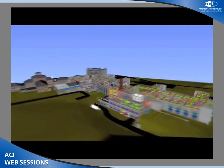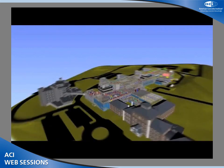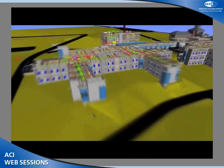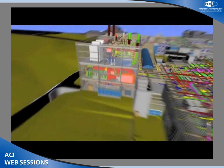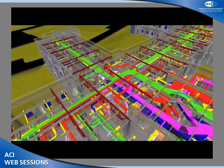Here is a quick fly-through of the overall model. It's a pretty big project and we had many different collaborators producing 3D content. We're collecting models from Revit developed by the consultants and also models from various software developed by the subcontractors. Each party is developing that content for their own purpose — subcontractors producing 3D models to manage shop drawing production or run CNC machines to fabricate ductwork. As a general contractor, we bring all this content together as submissions and integrate it into Navisworks — very similar to a typical shop drawing submission process, but instead of drawings we're collecting models.